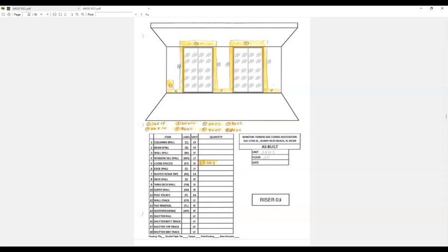You see the numbers, the exact measurements of the exact location, and how much square feet that is. For example, it's 36 by 18 inches, this square here. This line here, number 5, is 96 by 5 inches. If you summarize all of that, you will come up to 33.66 square feet. If you go back to the quantities, you will see that exact same number here.